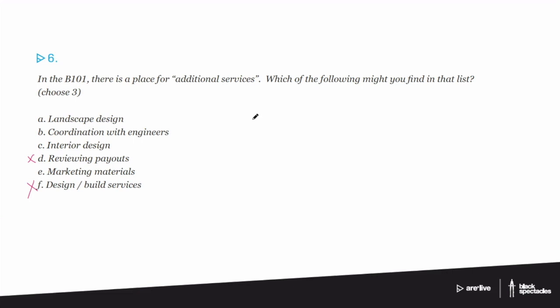So the contractor is going to, monthly say, could be every 2 weeks, could be every 2 months, could be at milestones, whatever. Typically it's monthly. The contractor is going to hand in a payout request. They're going to say, yeah, we're a third of the way through the project and here's how much money we expect to get at this point.